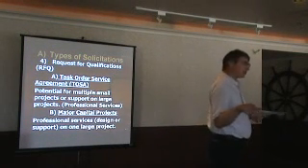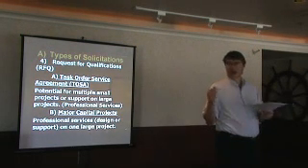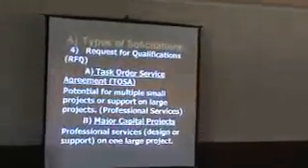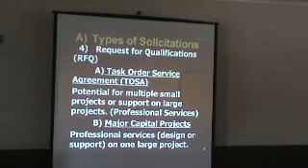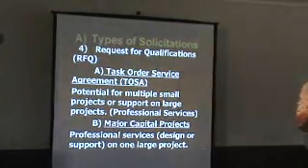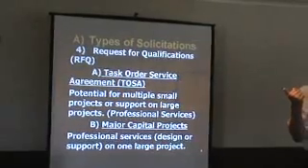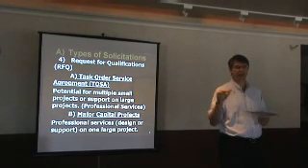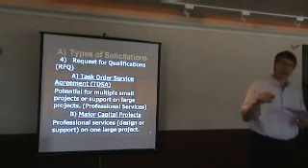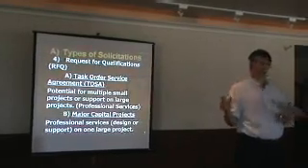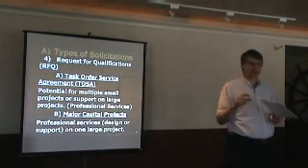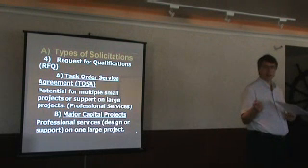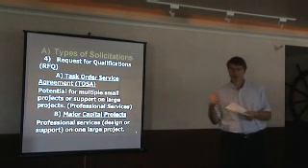For professional services, I just want to touch upon this because if any of you are consulting engineers, geotech, something like that, you might be interested in this. We have something called a task order service agreement, a TOSA, and it allows us to get supporting services either on minor cap, including architecture on minor cap, and then on major cap, just supporting services, not full design services. It allows us to use somebody piecemeal from time to time.